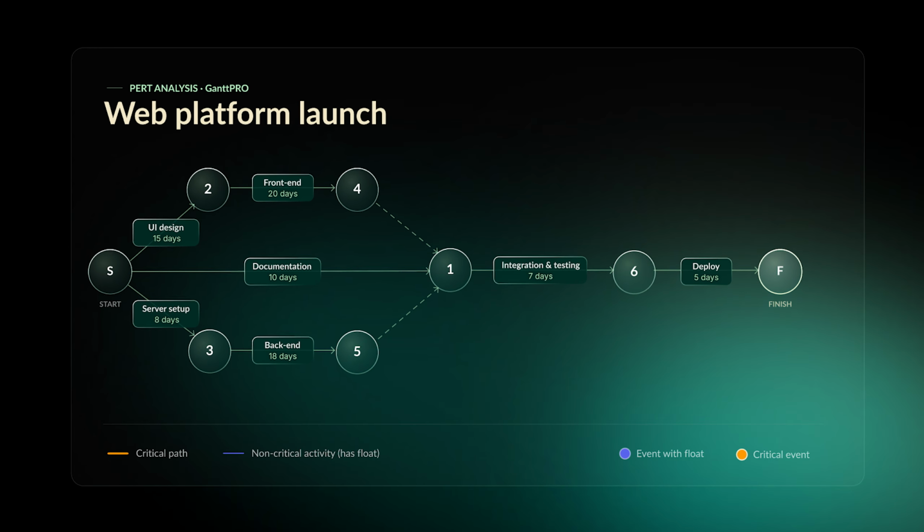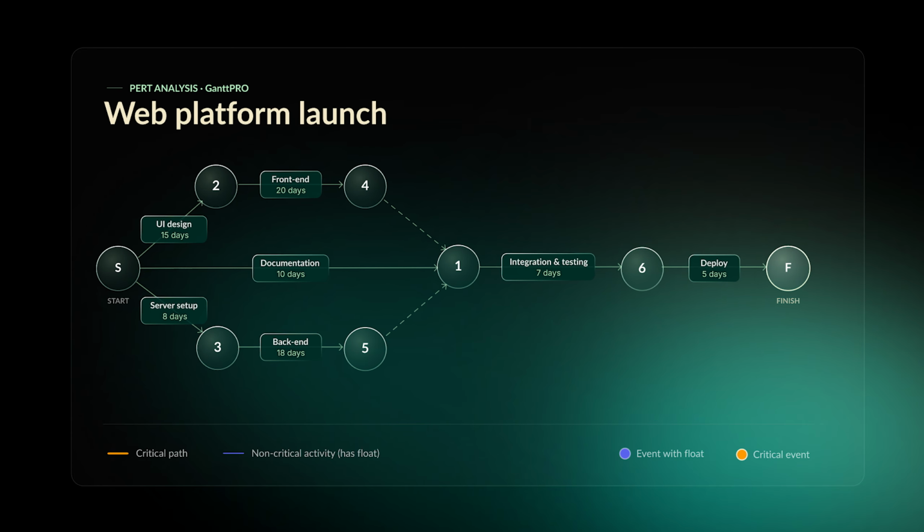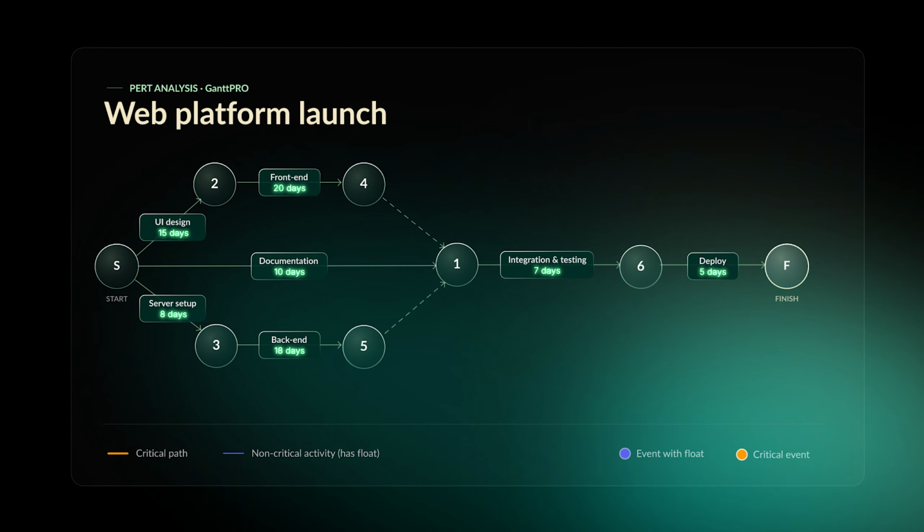As you see, position of tasks relies on dependencies. Not on priority, not on who's assigned, not on deadlines. What PERT chart also features is duration.